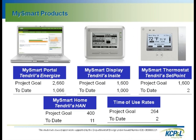One of our biggest challenges with this product is that we have about 10,000 customers in that area, but only about 8,000 are residential. Of that 8,000, we're only projecting about 50% to have internet access. So it becomes a challenge to reach our project goals — doing the math, you end up thinking almost half the customers we need to engage won't use the energy management portal. For those without internet, the other option is the My Smart Display.